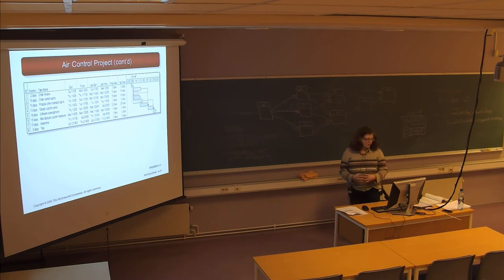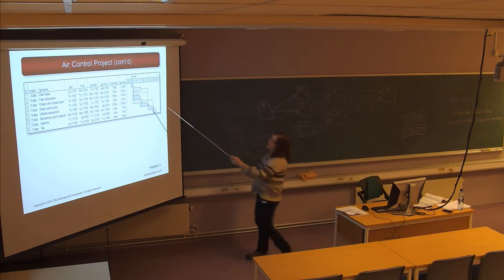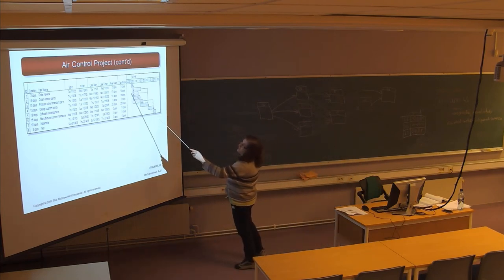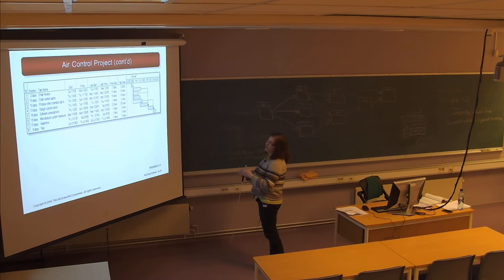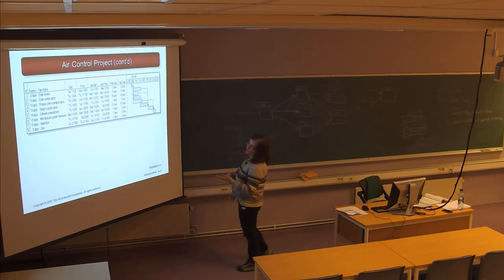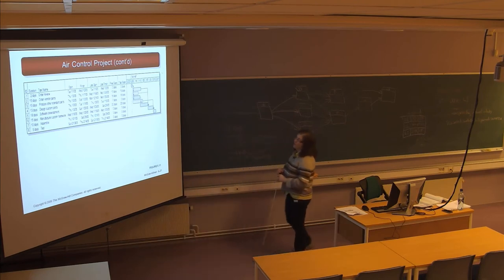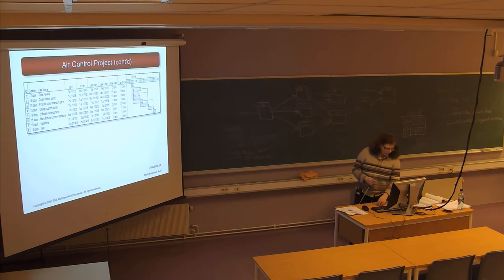A Gantt chart shows visually the amount of time each activity takes, with late start and late finish dates. You can mark the target time when you want to start and finish, and also record when you actually start and finish during the project. Different colors can indicate what has actually happened versus what is planned — it's a good tool to ensure you're on schedule.